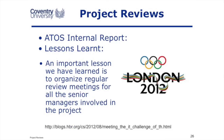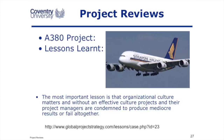The London 2012 Olympics — what was learnt from that? One of the committees involved said that they've learnt to organise regular meetings for senior managers. Communication — good lessons learnt for any project. And the A380 is a project that was delayed and caused the company great financial problems. One of the lessons learnt is that it's about organisational culture, and that culture affects projects: people being motivated, people working together. The key factor for successful projects is having a good, open, honest, and trusting culture where projects can run, rather than a hostile culture where people are going to get blamed and punished.